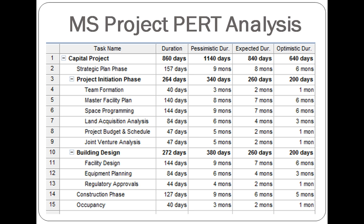Microsoft Project does this automatically; however, it can be done by hand as well. Essentially, all three estimates are considered, but the formula gives the realistic estimate 4 times the weight of the pessimistic and optimistic estimates. The resulting durations can be seen in the duration column. Partial days after calculations were rounded up to the nearest whole day. Take particular note of the overall estimated project duration, which is 860 days, as well as the duration of the first three subtasks: 157 days, 40 days, and 140 days. I will visit these numbers again later.